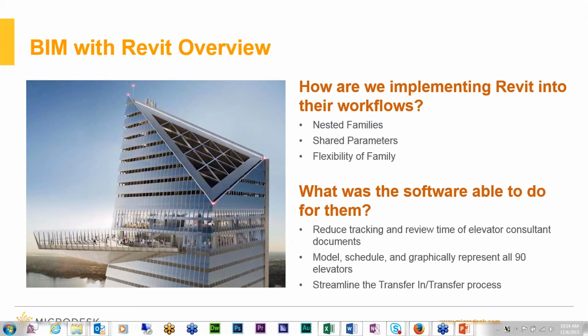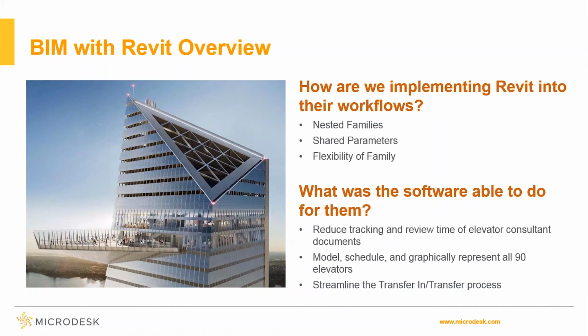So part of what BIM and Revit really helped us do was take about 5 or 6 different players in this and really bring this down into one very streamlined process with very quick turnaround, that when we look at the CA phase that we're in now, and we still have elevator changes, from the time that change comes through KPF stores, it can go back out in a drawing construction document set in less than 1 day, really in just a few hours.